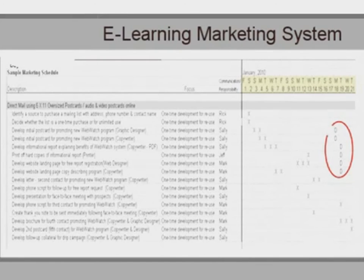An example would be my direct mail tactic. If I plan to send out my direct mail postcards on the 20th, that doesn't mean I need everything done by the 19th. I'm mailing to 600 prospects. I need to have a mail house mail all of that collateral for me. In order for them to mail on the 20th, they will require everything to be in their possession by the 18th. So in reality, the 18th becomes your deadline date. Notice that's what I've listed in my marketing schedule. But now you can work backward from that date to ensure you have sufficient time to execute all the necessary tactics and make this strategy produce clients for your business.